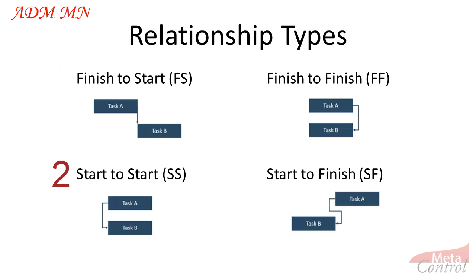Start to start, when the successor task starts with the beginning of the predecessor task. Finish to finish, when the end of successor task finishes with the end of the predecessor. Start to finish, when the successor task finishes with the beginning of the predecessor.